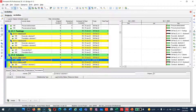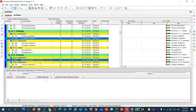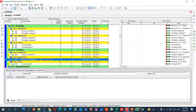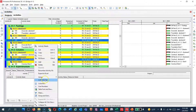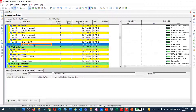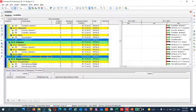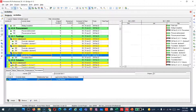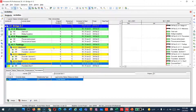You can continue assigning relationships this way — either click to assign directly or highlight and link. I can send you the Excel file as well. Construct abutment one happens after finishing the footing, construct abutment two after finishing its footing, and construct bent after finishing the bent footing. Once you finish the bent you can finalize. I'll continue and you can do this on your own to save time. The next lecture will cover critical path — I hope you liked this lecture, thanks so much guys and see you!